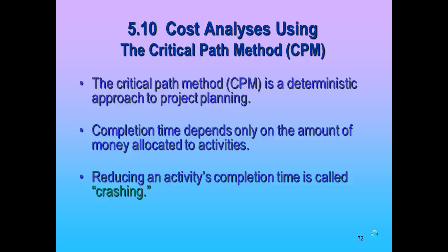But that's what's called a discretionary dependency, meaning it's not a hard logic dependency. Like when I bake the pizza, I have to preheat the oven before I put it in the oven, right? That doesn't make sense otherwise. That's a hard dependency. But fast tracking is saying, let's get rid of the discretionary dependencies and do it at the same time. Let's not wait for one to be done to do the other. So let's paint and have the carpet guys in at the same time.